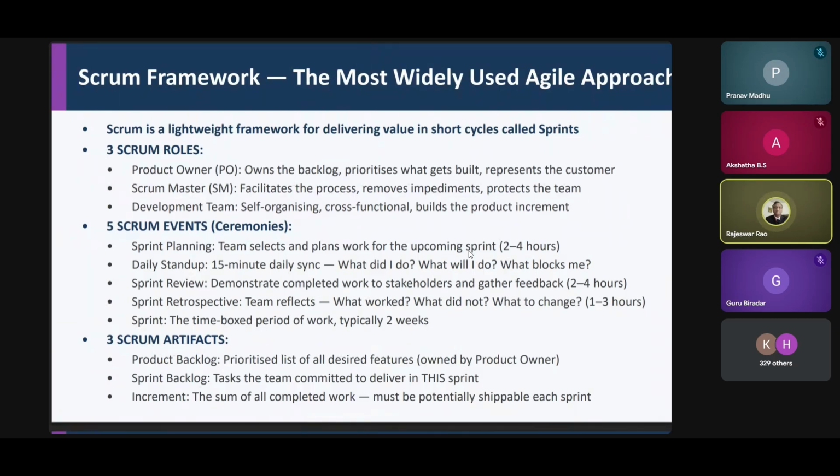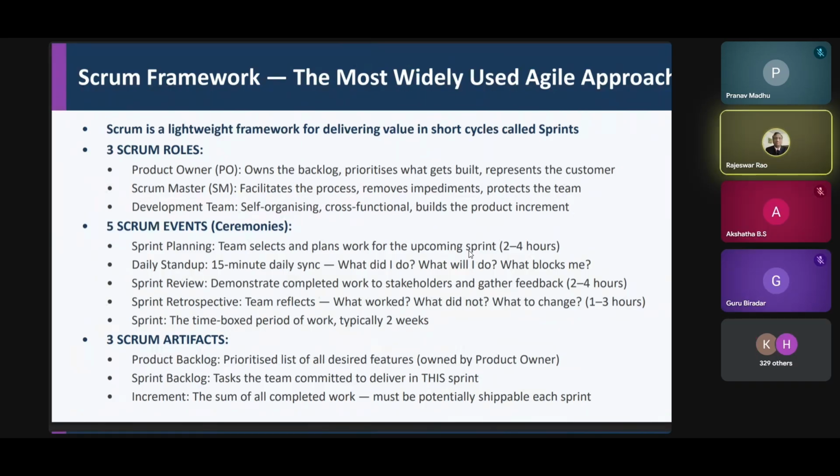That means the entire team meets for about 10 minutes. They review what happened yesterday, how many backlogs there are, whether there are any constraints, any challenges, any changes to the job to be done, what is planned for today, how much is carried forward from yesterday, replan it and get onto the job.